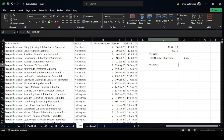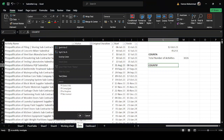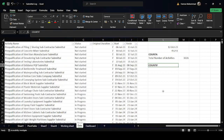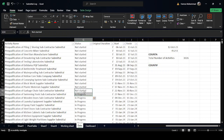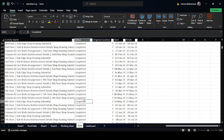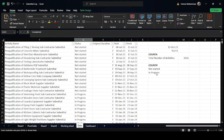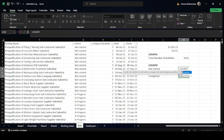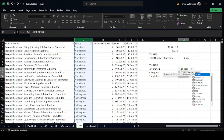The second function is COUNTIF, which is used when there is a single condition. For example, in the Status column we have three types: Completed, In Progress, and Not Started. We want to know how many fall into each category. I copy the status values to avoid spelling mistakes, then select the three cells and start typing the COUNTIF formula, pressing Tab to complete it.